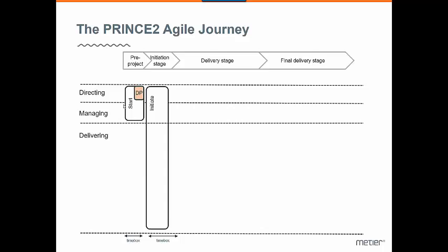Initiation stage, you use initiating a project, and as you see, I've drawn that covering from the project board to the project manager and the teams. You definitely want to have the teams involved here. In this case, we have team 1 and team 2. So they're there creating the project plan. The project manager is there, of course, and the project board should be there as well. They should be there to kick it off.